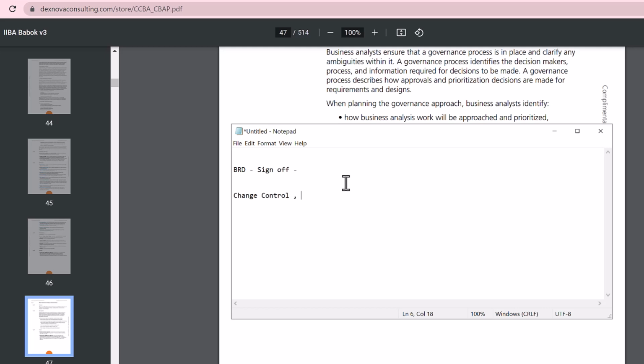And when they submit this change request, it's not up to you to decide whether this can be done or not. What you have to do is, once they submit those requests, discuss internally with your team, because now the budget may increase or decrease. Our developers would have already started the development, so we don't know how much effort they have put in from their side.